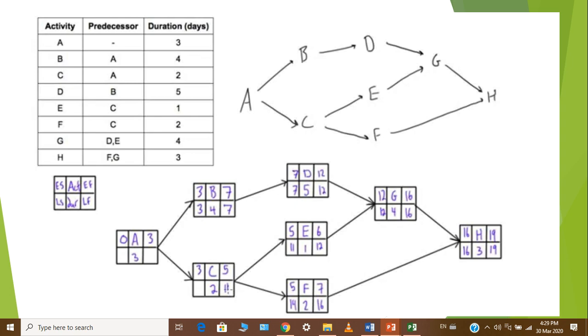Going backwards, we would look at the smallest of two or more options where there are dependencies. Again, this is a repetition of what is in the video, but with a focus on how to do it, because not everyone is expected to get it right or understand it at first. So, for example, we look at our dependencies. Our multiple dependencies happen from H, and we go back from H, where multiple dependencies would happen back there from G, D, and then to E.